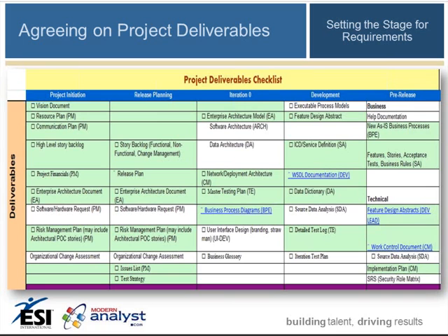What I want you to take a look at, however, is that there is in fact a test log and a test plan that comprise every iteration's documentation. So we are building testing in at every iteration, and you'll recall what I mentioned earlier, that an iteration under Agile can be anywhere from a 2-week to a 2-month time-boxed release of a product. And so we are building the testing in right from the outset, and it comprises a critical piece of every iteration.